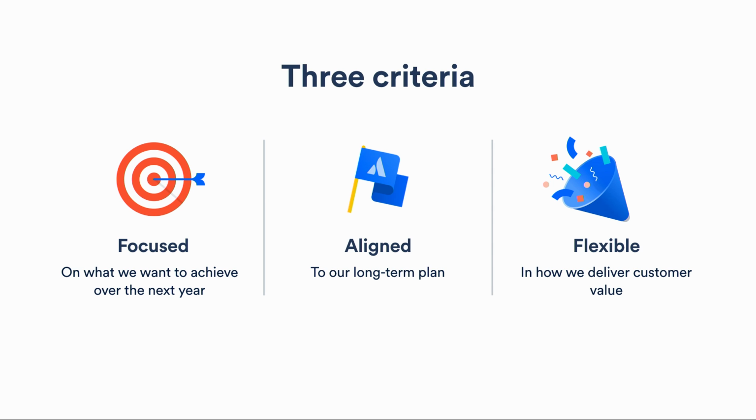Generally, problems will remain, but the way that we build out those features and the way that we solve that problem can change, and it can change very quickly. So committing to a feature really strangles you into this place that makes it hard to move. And secondly, technological change. We are consistently updating the way that we build products. Even our team has started using a new front-end stack. So some of the things that we couldn't plan to build 12 months ago are now a lot more viable because we're using a slightly different technical stack. So committing to a feature rather than committing to a problem is problematic and reduces the flexibility that our team has.